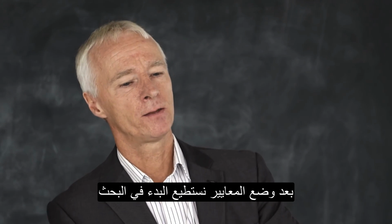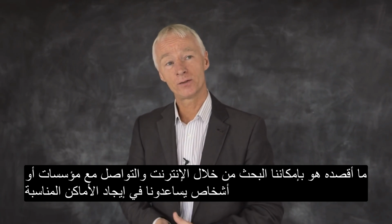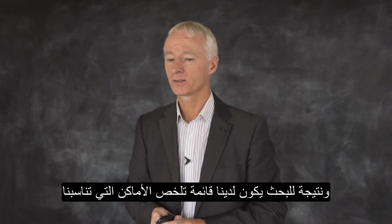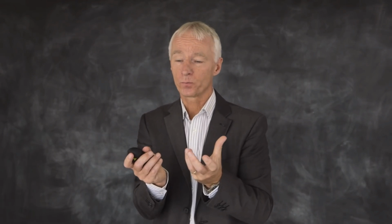And the venue criteria then allows us to search. And what that means is that we can go online, we can talk to venue finding agencies and all those sorts of people and actually work out, kind of shortlist a bunch of venues that fit us. So we do a shortlist, we then need to go and visit these people, have a little look around what it is they've got to offer.